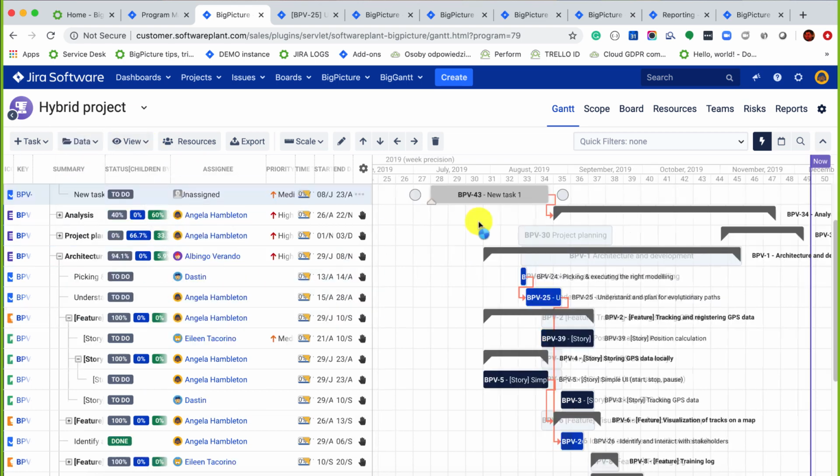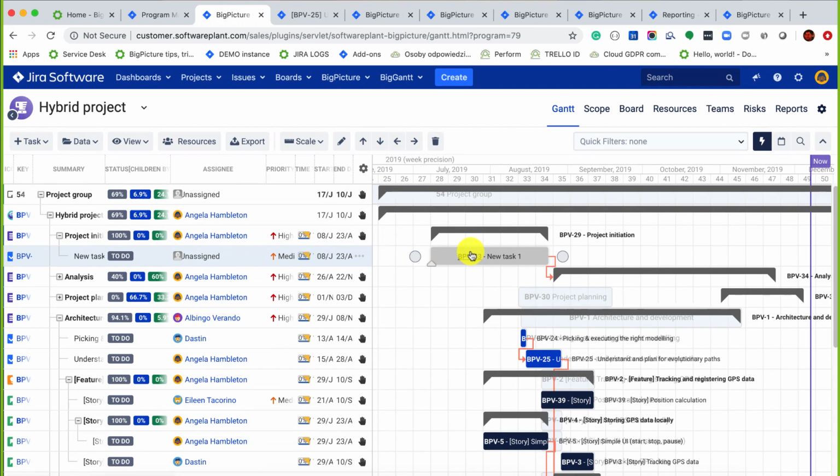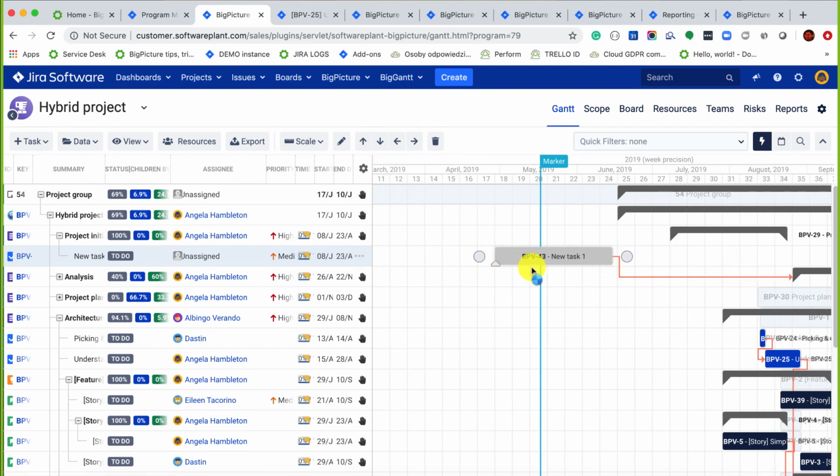Task mode manual, those automations are disabled. So now if I drag this task, you will see that the successor was not pulled to the left. Also, the gray bars are now partially yellow. Yellow bar indicates the position after the parent task in that case would be recalculated.